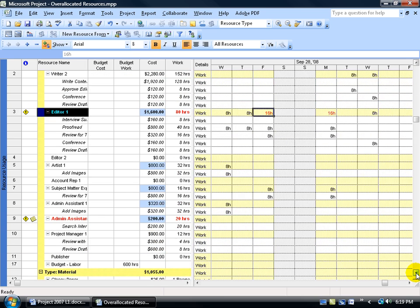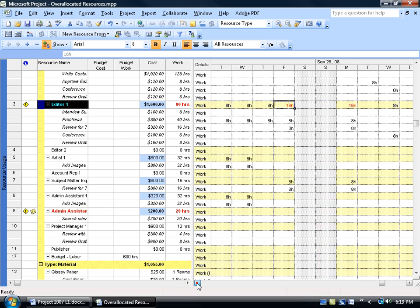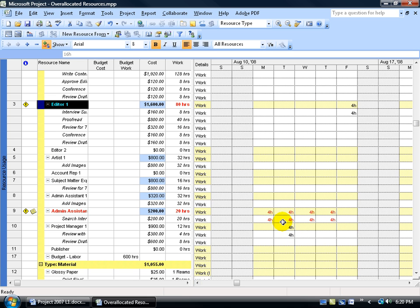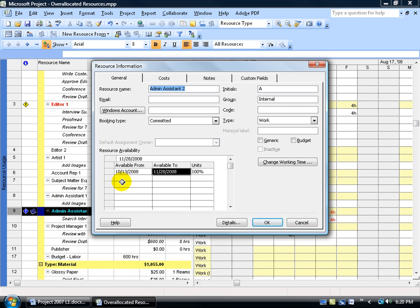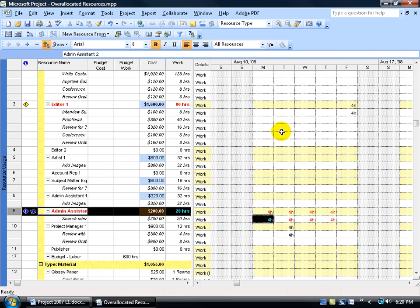We passed up part of the timeline, so we missed the administrative assistant. Scrolling back — there it is. The admin is over-allocated not only on the summary of the day but also on the task itself. When both the summary and the task are in red, it tells me that resource shouldn't be working that day, or isn't available in August. Double-clicking on the administrative assistant resource confirms their availability date is October 13th. So we're in August — that person isn't available. We need to unassign them or change the availability date to include August, starting on August 11th.